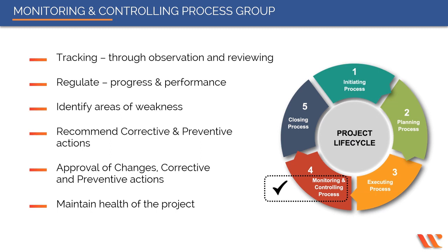For example, if one activity missed its planned deadline, it may have an impact on the next set of activities, the resource plan, the budget, and the overall project timelines. You may have to adjust the schedule or the budget to ensure your project stays on track. Think of monitoring and control as a regular health checkup of your project. The more thorough and regular it is, the healthier your project will be.